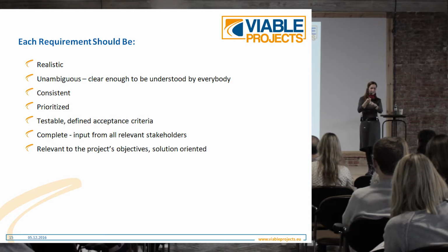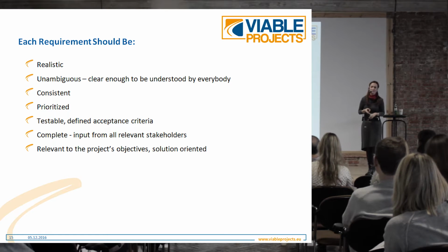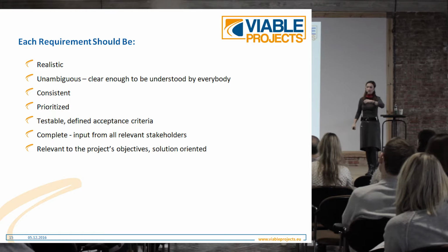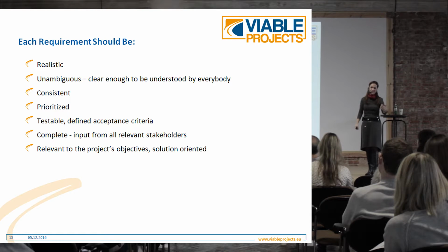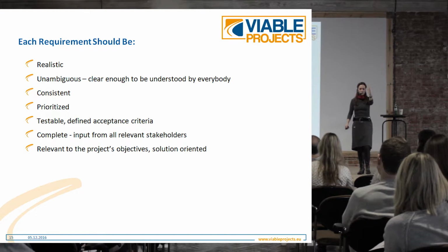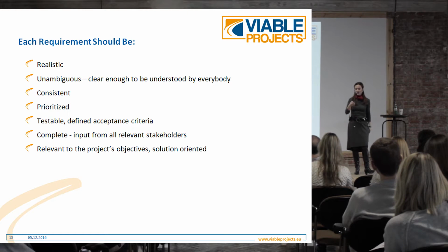So each requirement must have an acceptance criteria defined so that we know when we have achieved it and we can measure the success. Complete and relevant to the project objectives. So always the business analyst bears in mind where do we want to get, what are the objectives of this project.